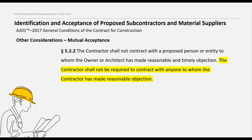The sections that follow 5.2.1 provide other important considerations during the process of identifying and accepting subcontractors and material suppliers. For example, Section 5.2.2 requires that the subcontractor and suppliers must be mutually acceptable to the owner, architect, and contractor. Essentially, this section states that while the contractor cannot utilize a proposed subcontractor that has been timely rejected by the owner and architect, the contractor cannot be forced to use a subcontractor to whom it has also made reasonable objection.